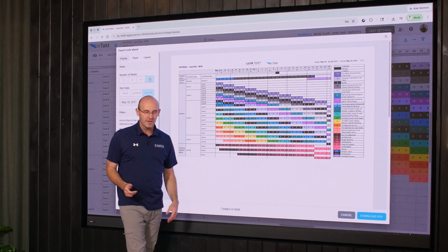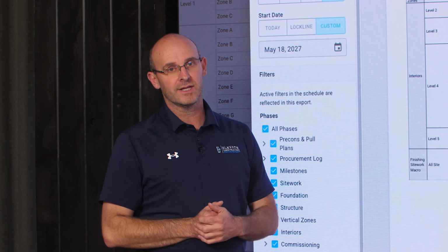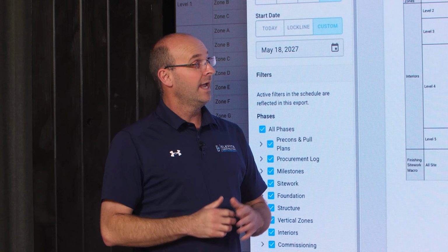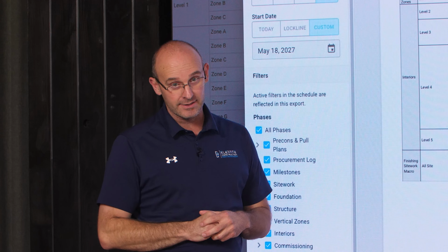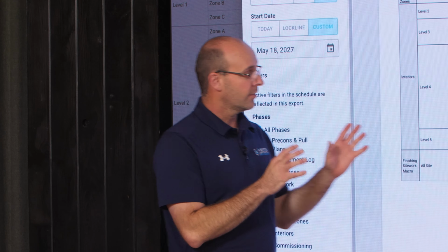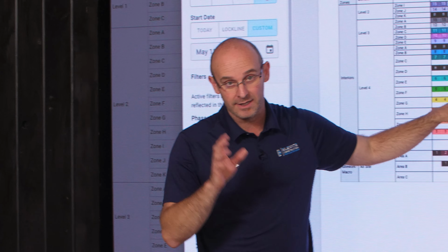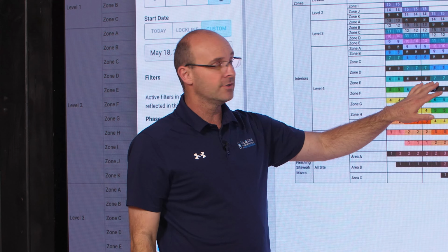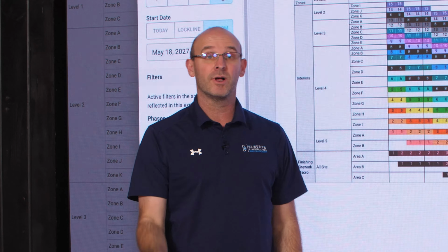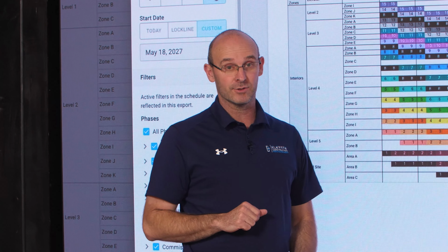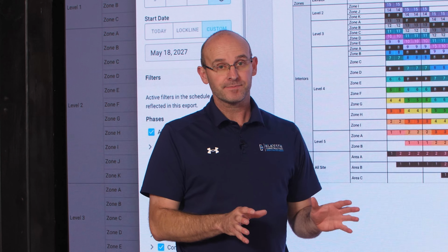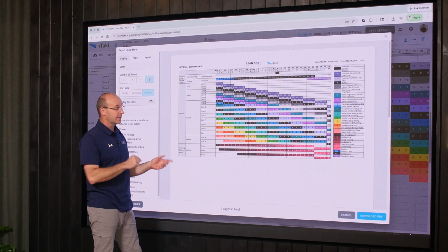Really, really cool stuff. What you do in your Trade Partner Weekly Tactical is set a timer either for 2 to 10 minutes, and you are asking your trades to look for things that are not made ready, that are not tracking to be made ready. And then what we do is we need to identify that as a roadblock and add that in the production plan as a roadblock. And we can show you how to do that as well, for the purpose of resolving that roadblock before the weekly work plan. So that's the utility of this plan.